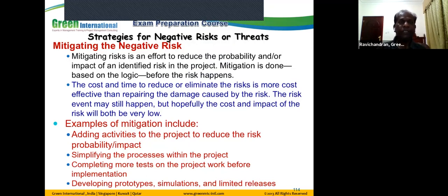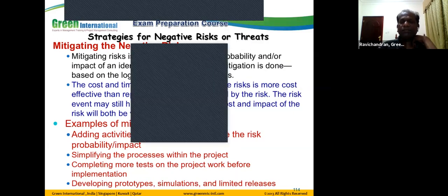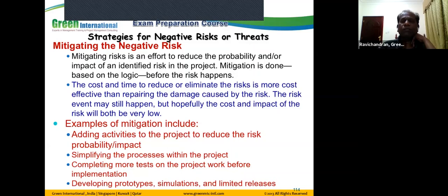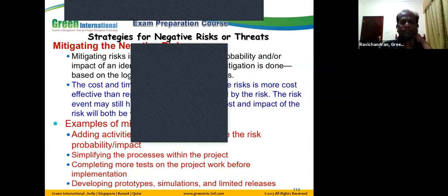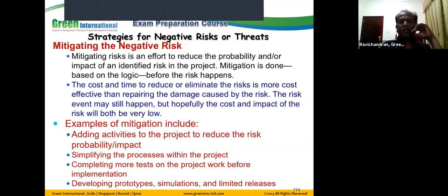No. If they do that, if there is a major problem in the car, all the 10 million cars have to be recalled. That's why when you do any model, they always come up with a limited edition. In each market, they put 100 to 200,000 cars into the market, and then they seek the feedback of the buyers on what problems and difficulties they are facing in this model. After the feedback, they try to resolve the design and other elements. Then they go for mass production, right?